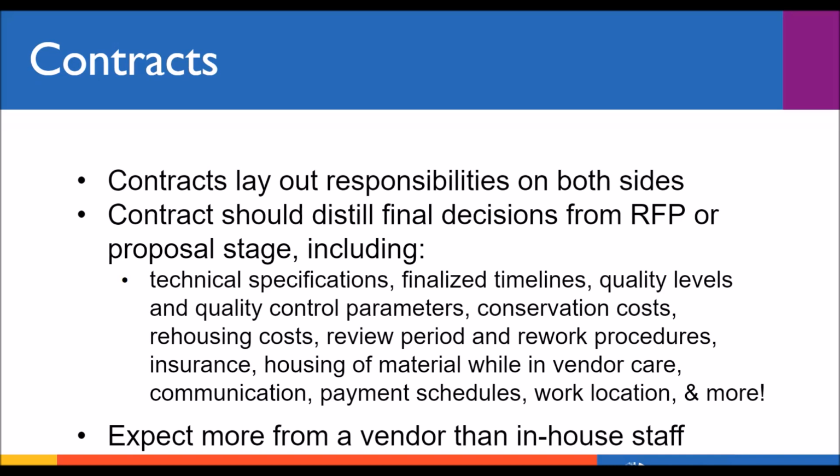Now, this contract should distill everything that you decided on or discussed at the RFP or proposal stage. So that's your technical specifications, timelines, quality levels, costs, all of that should make its way into the contract. Now, the good news is that one of the benefits of working with a vendor is you get to expect a lot more from a vendor than you would if you were digitizing in-house. I mean, this is one of the main reasons to use a vendor, is that you get to hold them to standards of quality and performance that might be impossible if you were digitizing using your own staff and equipment.